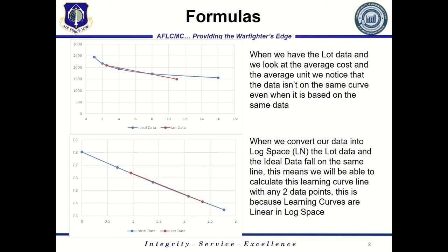So this is important because now we know if we have lot data, we can convert to log space in order to calculate that slope, or that curve, the learning curve slope, in order to figure out what the learning curve is without having to have that perfect pairing of the doubling of units.